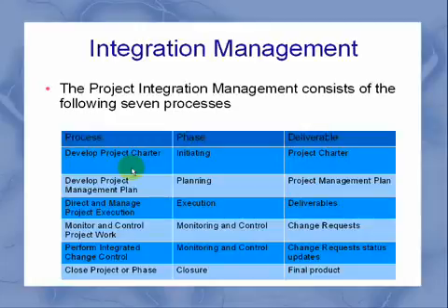The project charter is the input for the develop project management plan process, which is in the phase of project planning. And the deliverable for that process is the project management plan, which has the details about the project you're going to manage.